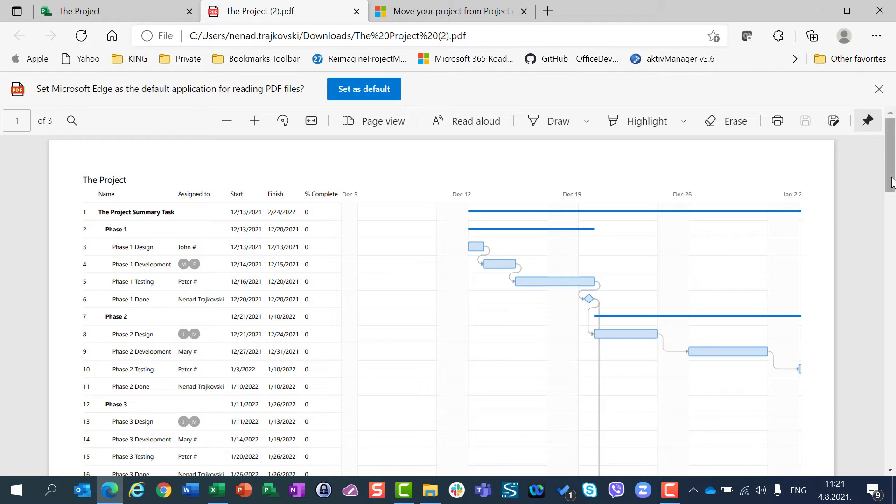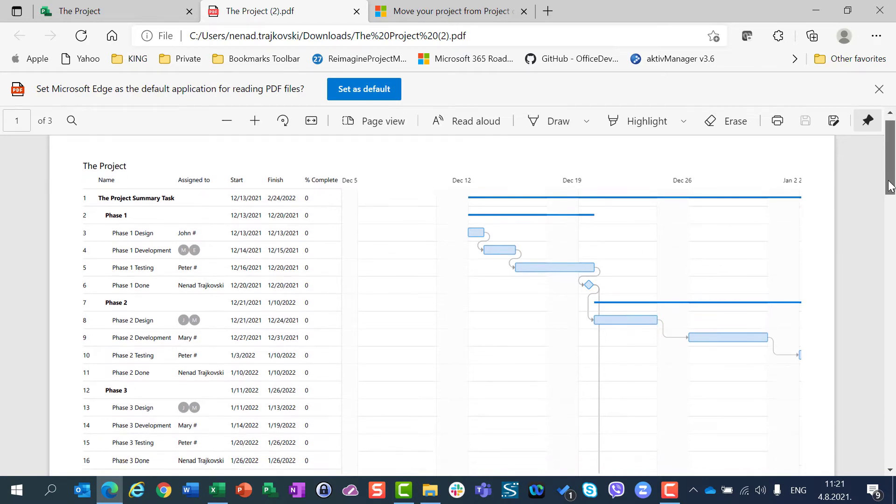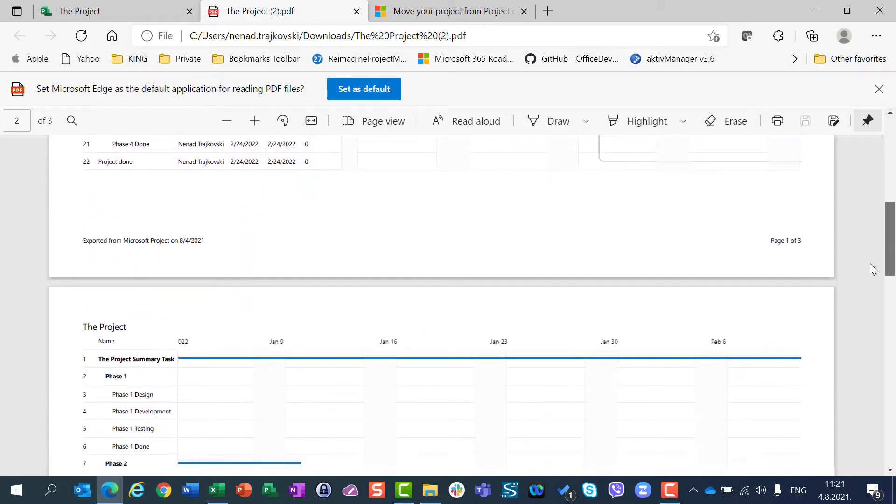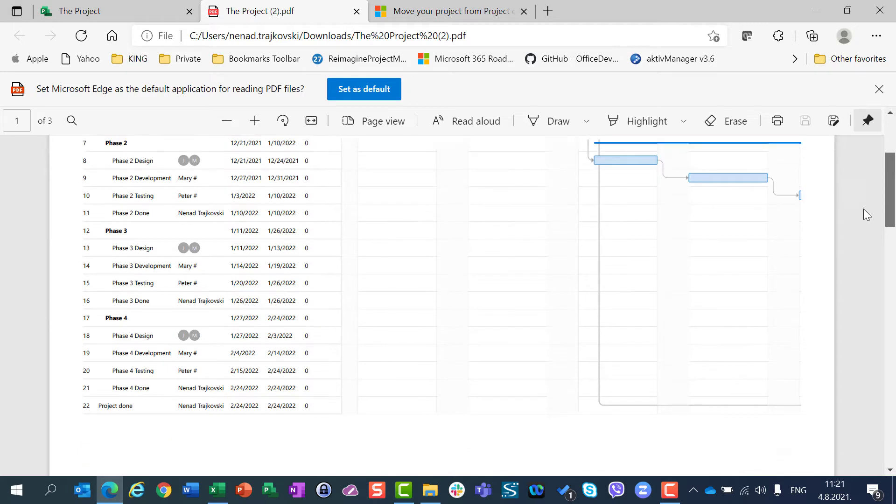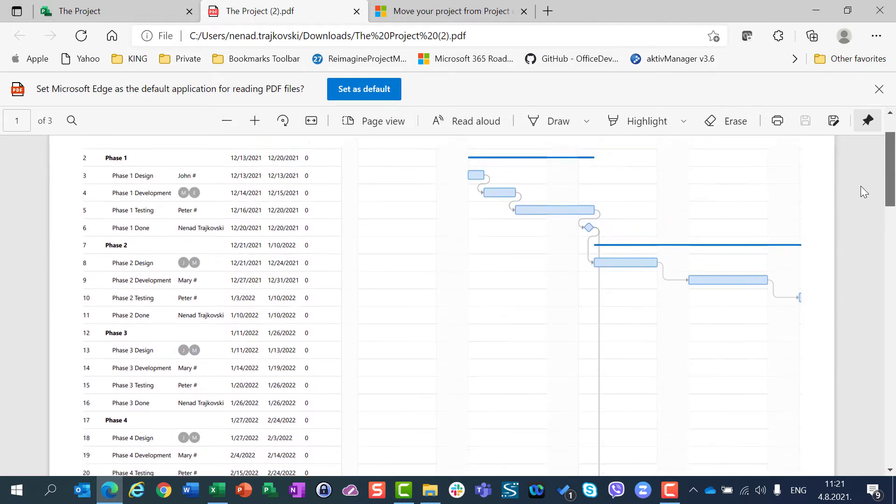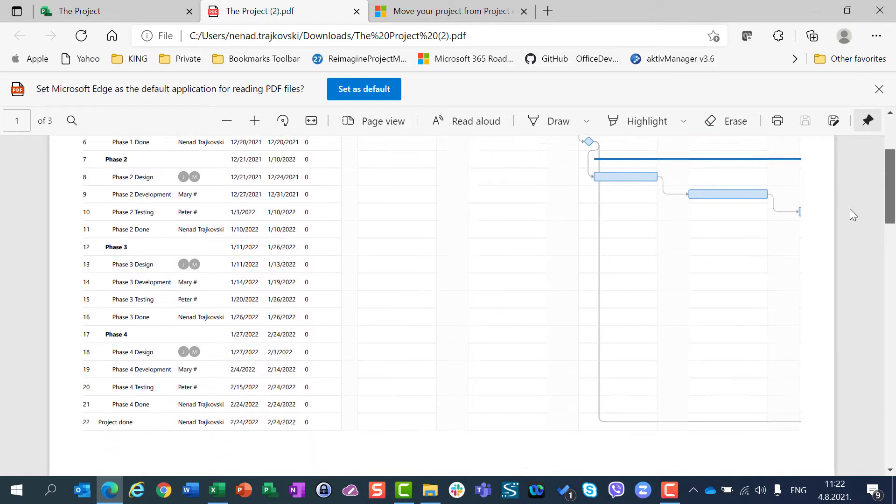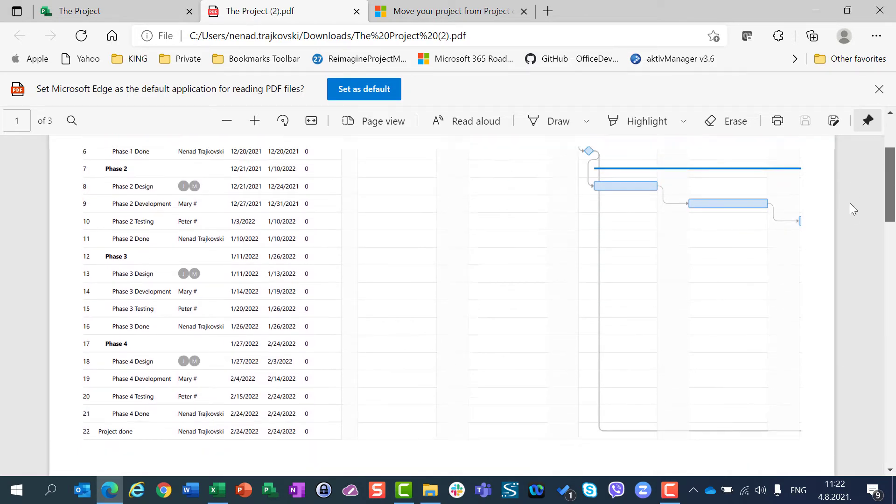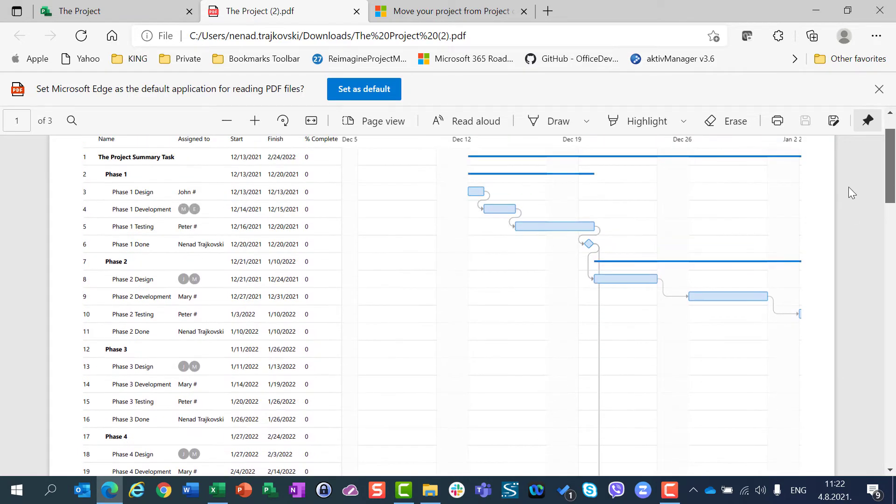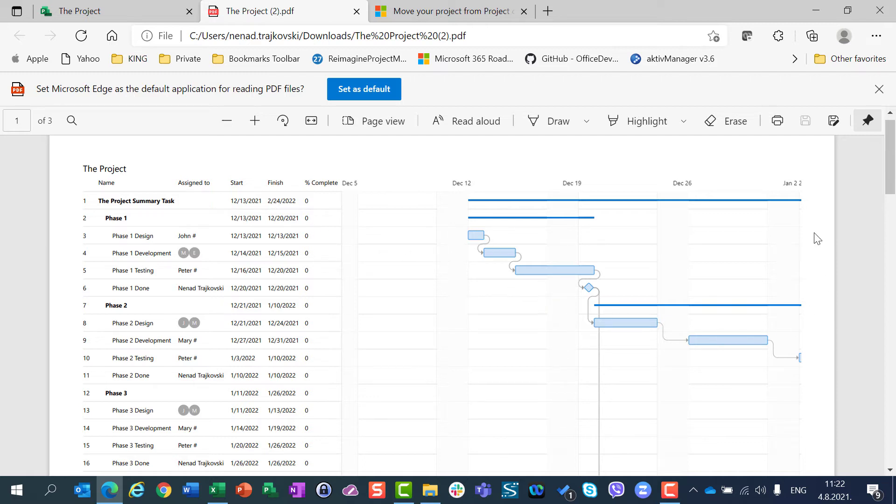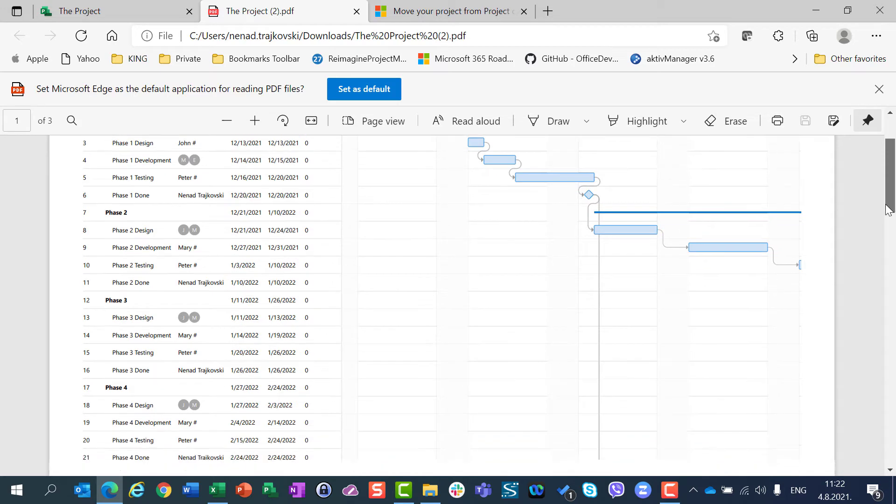which is here shown in multiple pages. You can see on first page all tasks with task name, task assignment, start and finish date, and percentage of completeness. And then you can see the timeline or Gantt chart.